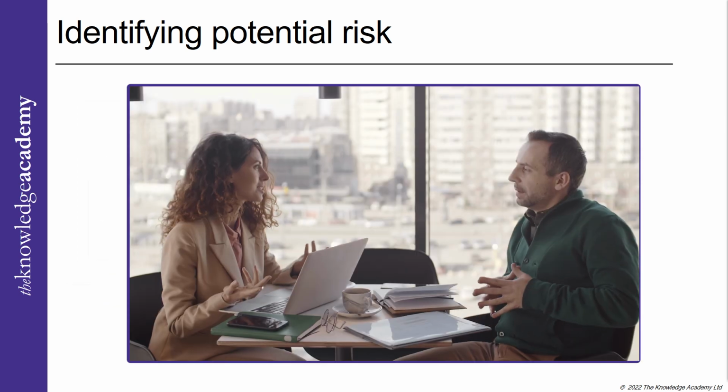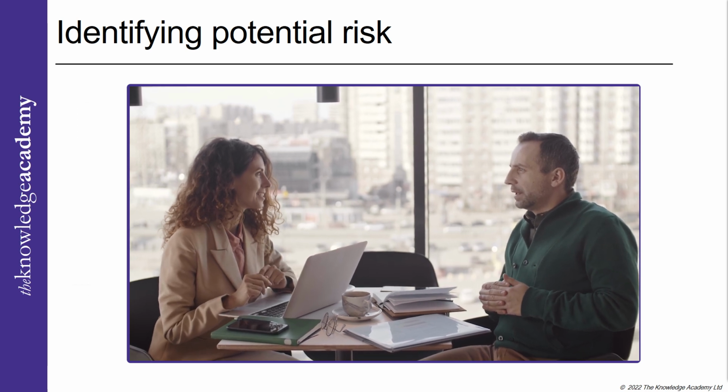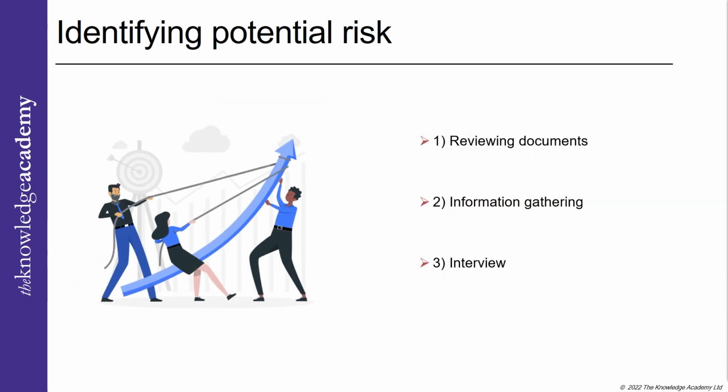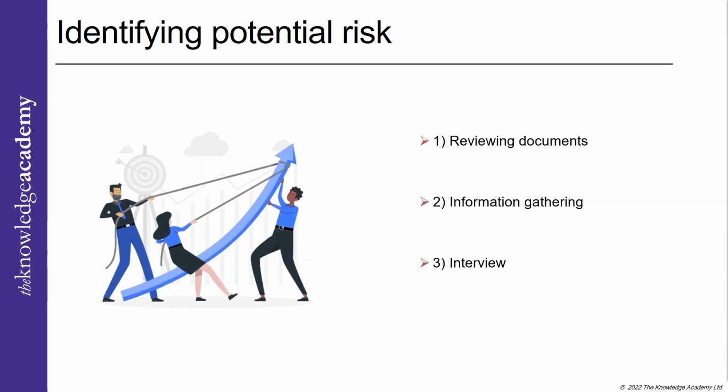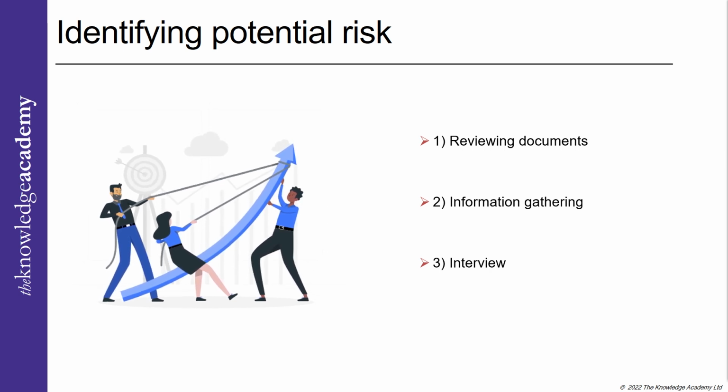Interview. You can take the help of pre-developed questions to get inputs from busy stakeholders by conducting a single interview with them. Additionally, conduct a careful review of project objectives. Each identified risk is classified on the risk register by several elements such as internal or external triggers, or by categories such as environmental, regulatory, technological, or resources.